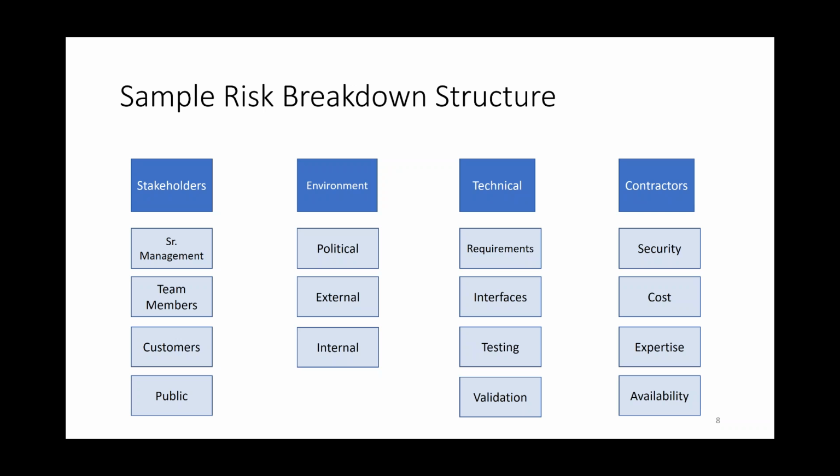Each project will create one that represents their project environment, what the key buckets of risks are, and then break those down into more subsidiary buckets, if you will. So you can see with the environment, maybe the internal environment, the external environment, the political environment. In sales, you might have a competitive environment. You might have an international environment. Under environment, it might even be the weather environment, right? We can't get it dry enough to pour the darn concrete, so we're behind.